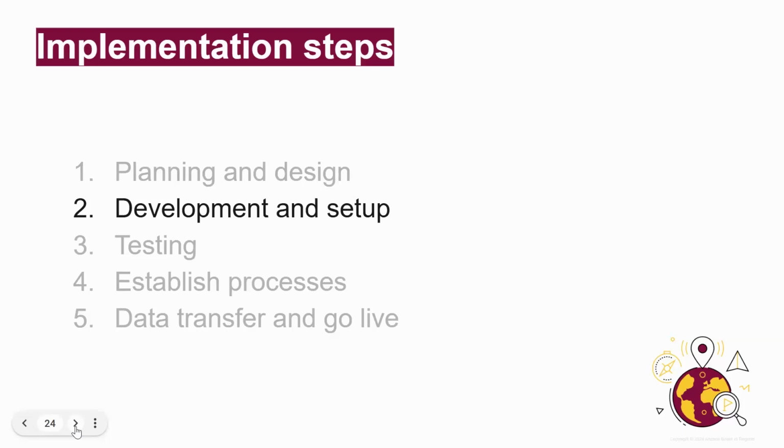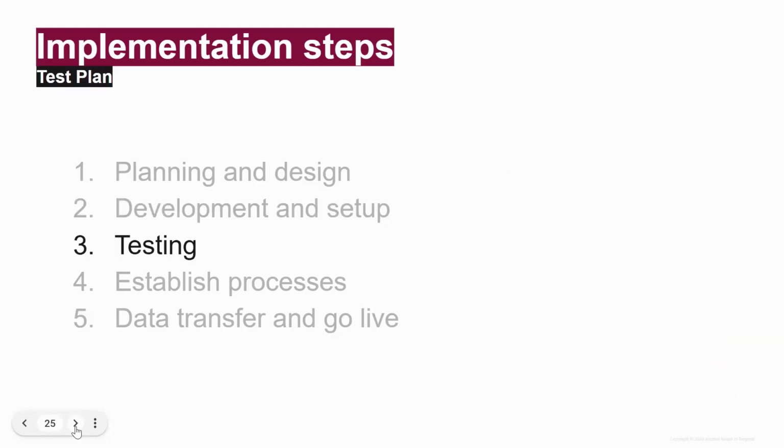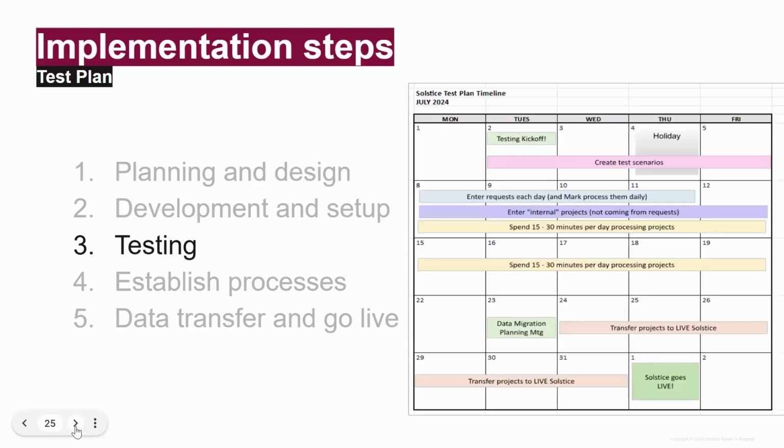Development and setup. So after the design, we had to actually get into the base and build those tables, fields, relationships, automations, and interfaces. And then once those were built, we got into the testing. And again, this is where we really needed the help of the team. So we set aside 3 weeks during which everyone on the team agreed to spend maybe 15 to 30 minutes a day entering projects, collaborating on projects in a test base that we had set up, and going through the workflow that we would from request to project to completion to collaboration every step of the way.